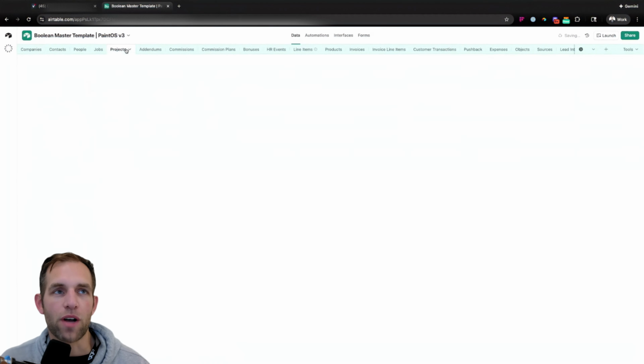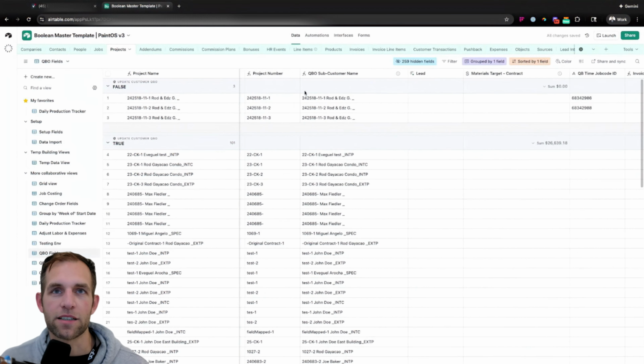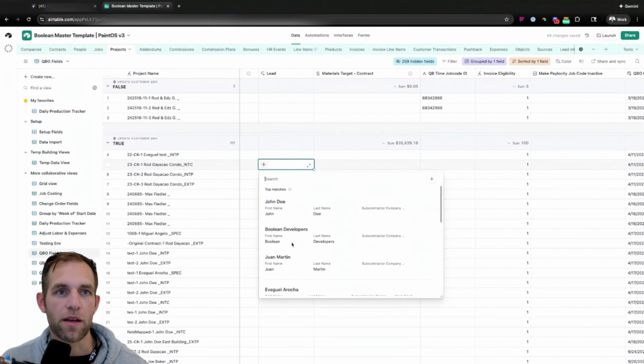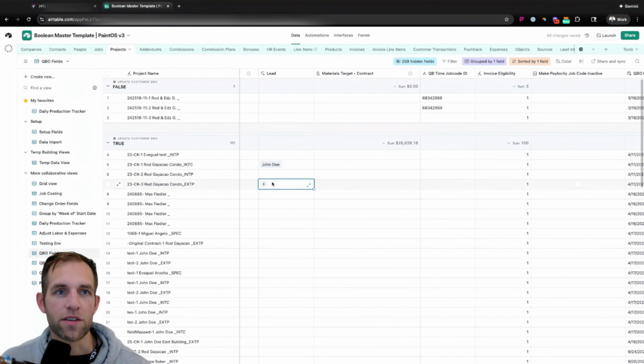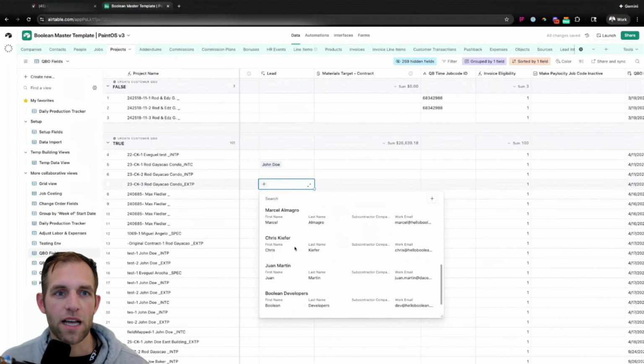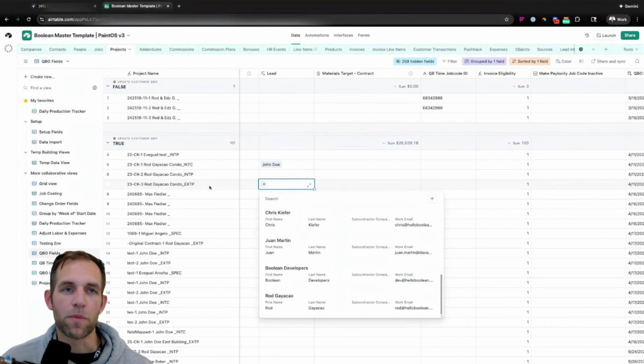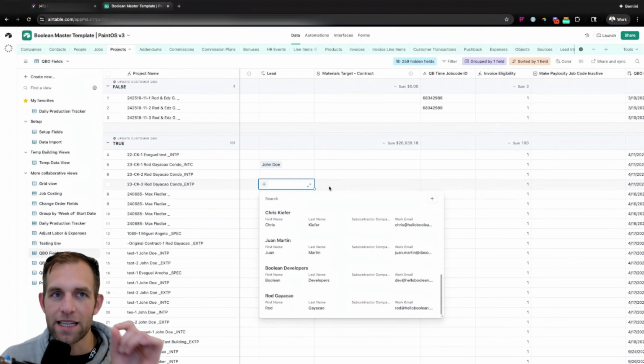When you go to projects, I can assign Chris as one of the people on the project. So I click here, or sorry, John Doe is the one I was looking for, and I can select John. Now I go to add John to this one, and what do you know? John's not available. That's because this is an exterior job, and I said that John is only capable of doing interior cabinet jobs. So the point is that relational database, this is just one tiny glimpse into why this is so powerful.